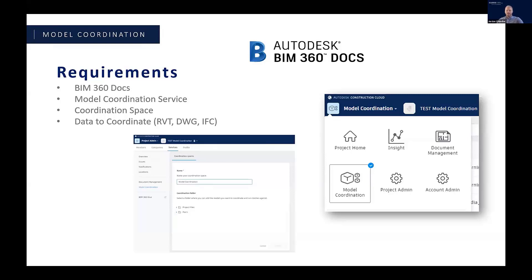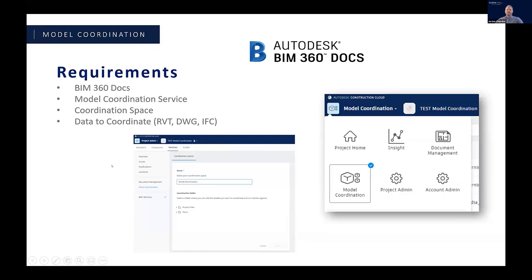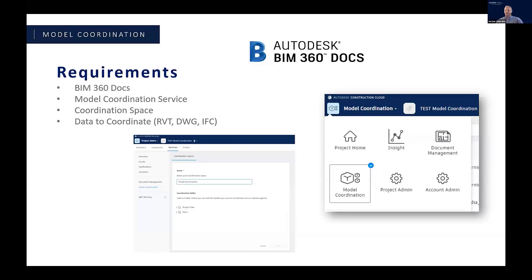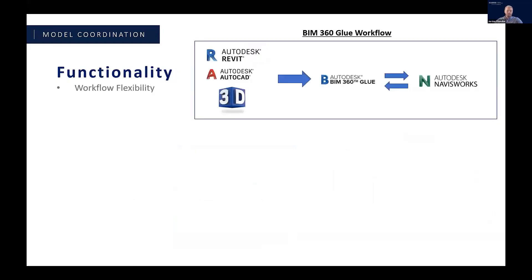The coordination space is simply that folder just within the BIM 360 docs environment, so you're telling docs I want to use this folder, it's located here, and model coordination will go pick the data out of that folder and run some of the coordination paths. And obviously we need to put some data in that folder to coordinate, and I believe as of now that data that we can use there are RVTs, DWGs, and IFCs as far as file type.